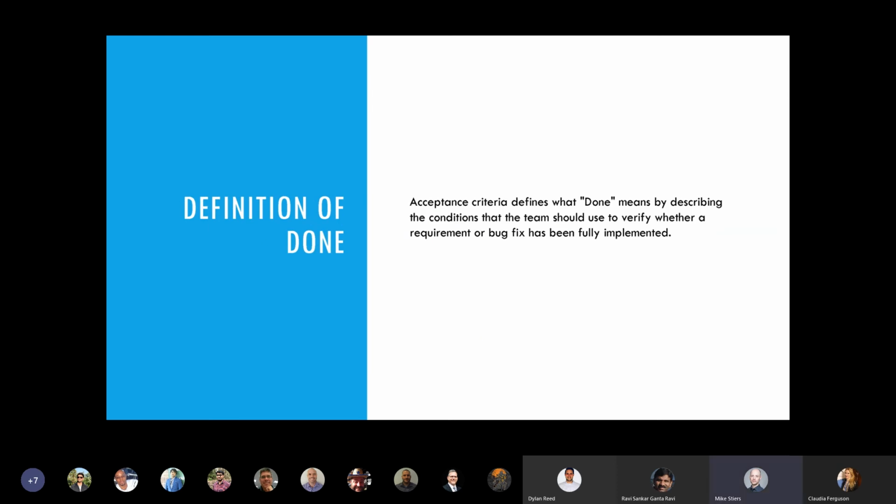And then finally, the definition of done. So not only is it important to define your user stories with a proper description that demonstrates the value of what you're about to be creating, the definition of done is also known as the acceptance criteria. So when people are working on their work items, they know that the story is only considered complete when the acceptance criteria is met, and there's a field inside of each story where you can define what that acceptance criteria is.